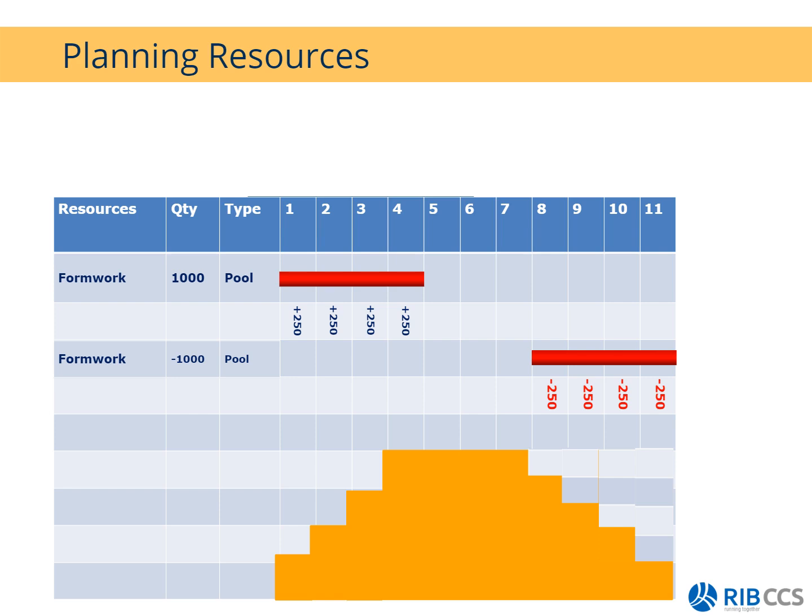Okay, so you start off with 0, 250 up to 1,000, and then at the end of it, you should be left with nothing, meaning that in theory, it should be returned to the pool. And this is also just a nice way to double check your temporary material, because I know of a lot of sites who've run at a loss when it comes to things like your formwork and scaffolding and so forth.